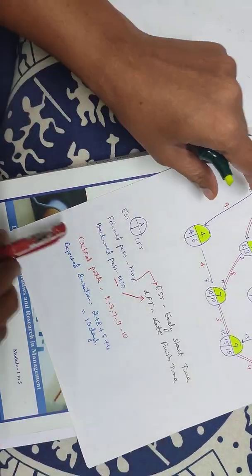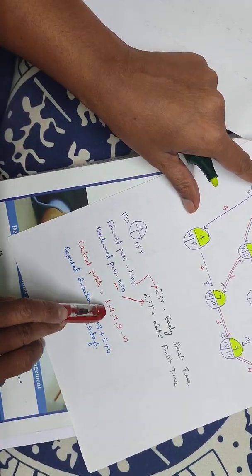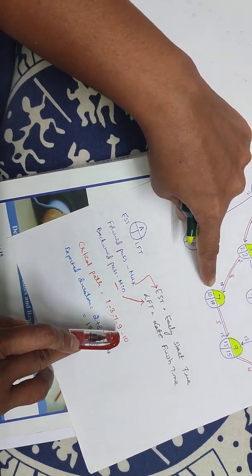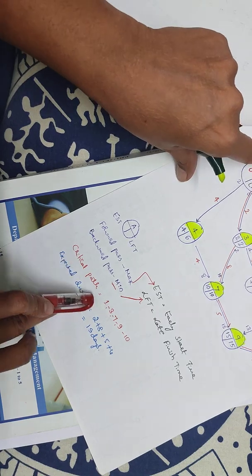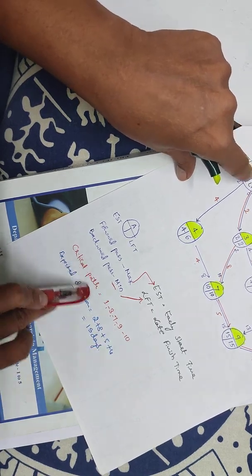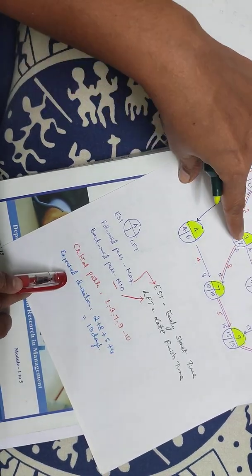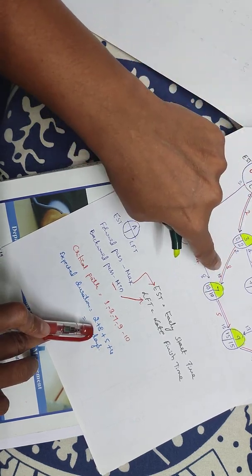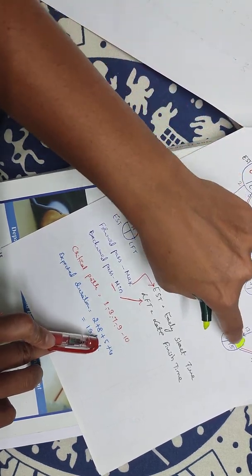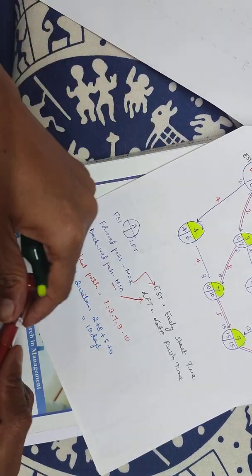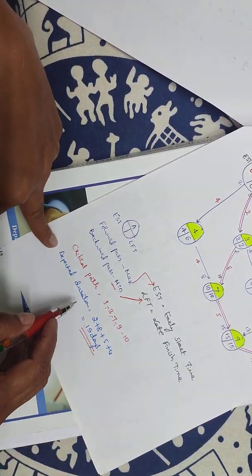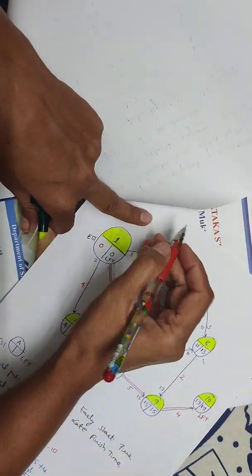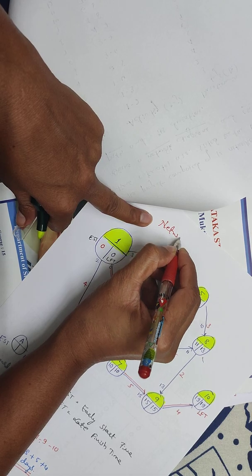Now we'll add the critical path: 1 to 3, 3 to 7, 7 to 9, 9 to 10. This is the critical path. Adding the durations: 1 to 3 is 2 days, plus 3 to 7 is 8 days, 7 to 9 is 5 days, 9 to 10 is 4 days. Total is 19 days. This is the expected duration, critical path, and network diagram for this problem.